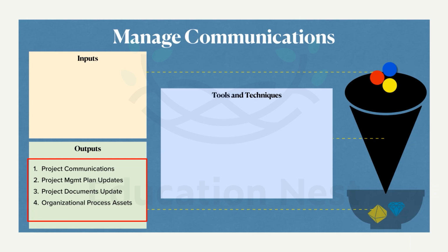Similarly, the project documents which are related to the communications get updated, like lessons learned, the stakeholder register, who is being communicated, and the issue log, the result of these communications, they are the issues. All these things get updated in the project documents.